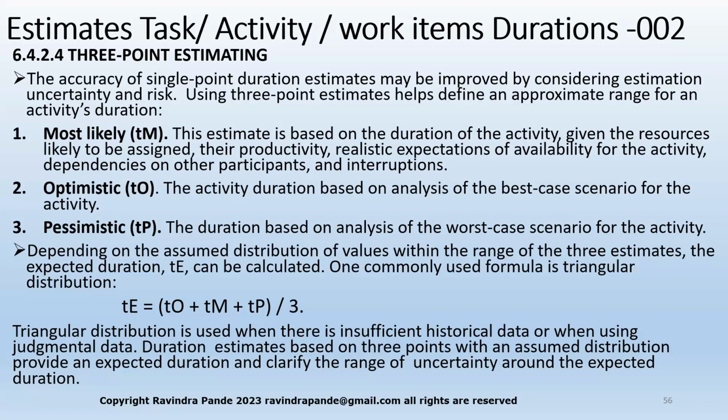Now let's understand, there's nothing right or wrong here. We are trying to understand, if we are making tea for the first time, we need to understand from others, like if they made the tea, how much time they took, and then I build a 3-point estimation, like I average it out. So 15 plus 12 plus 10 divided by 3 will be the actual 3-point estimation for this task, for this activity. Have you understood how this is done? So madam, anybody have any confusion?